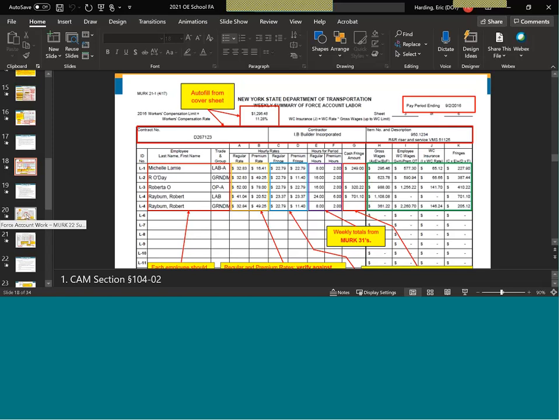So you're not going to reflect wage rate interview information onto a force account. You're only going to reflect certified payroll onto a force account. But if you're finding inconsistencies, then you need to bring it to the attention of your compliance unit and possibly the Department of Labor.